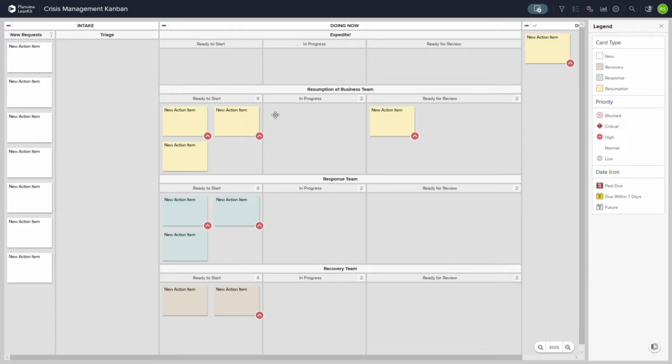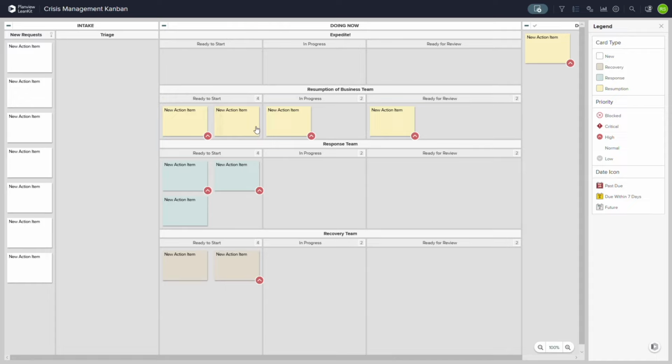As a team member, I would go back and I would assess what is in the queue. I would look for the highest priority or most urgent item in there, and I would pull that now into in progress. And also, because we still have a little bit of room left, I would again pull that there in progress. Now, that may seem a little foreign if you're used to working in a push system of just loading up the work where everything has to get done.